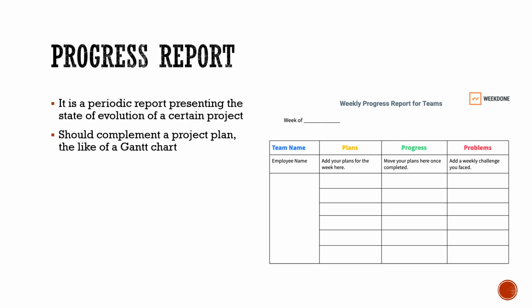And at the end of each step, you want to see if you are up to your plan or not. So you write a progress report. So this begins with a plan. You could plan it on paper, on Excel, or use something more advanced like a Gantt chart. If I look at the right side, I can see an example of a progress report. It's titled Weekly Progress Report. So in this project, they are submitting a weekly progress report.